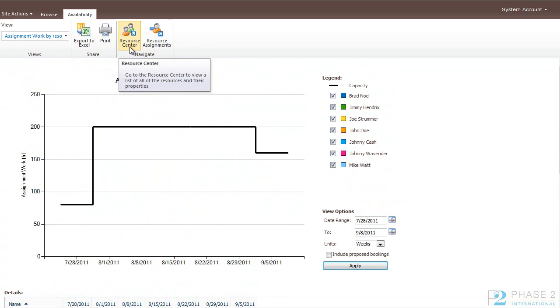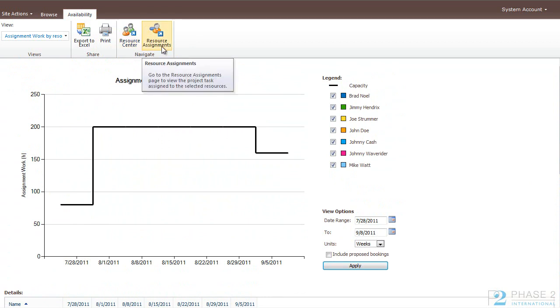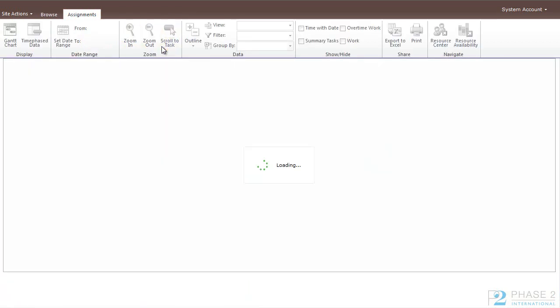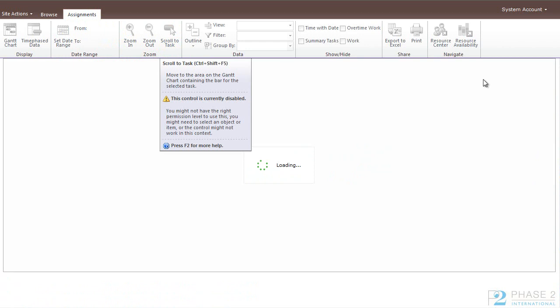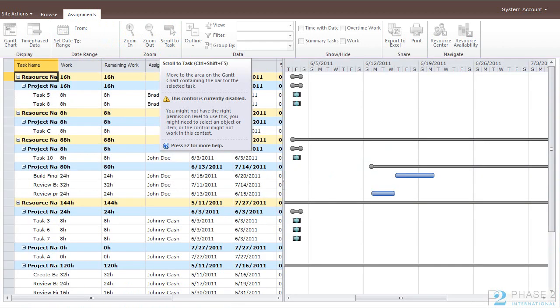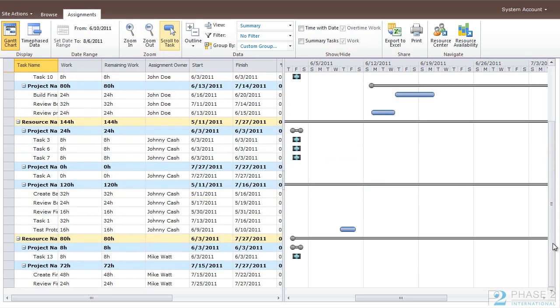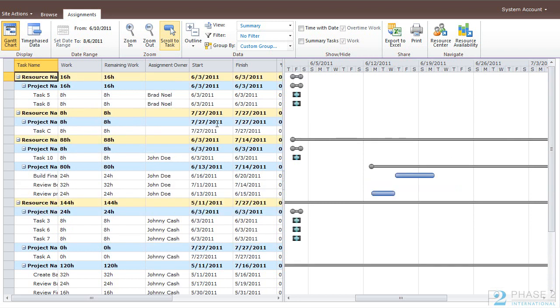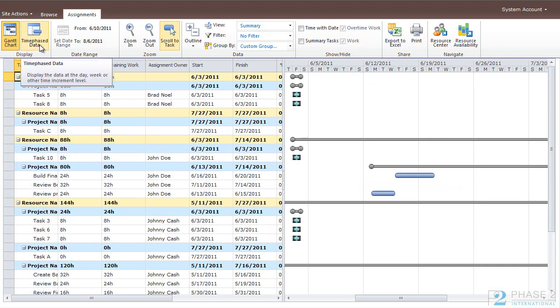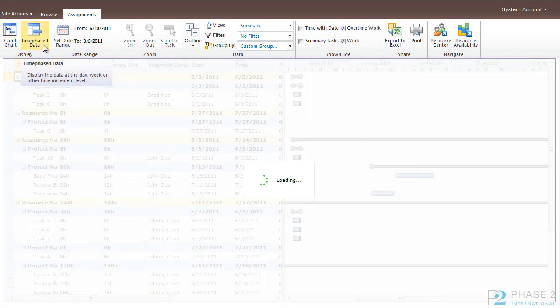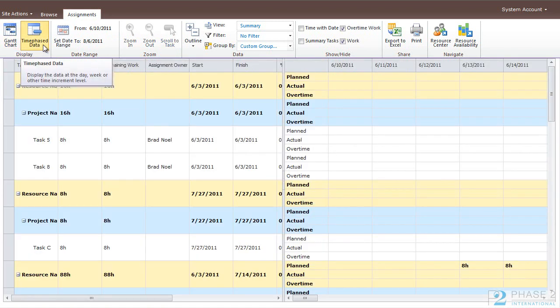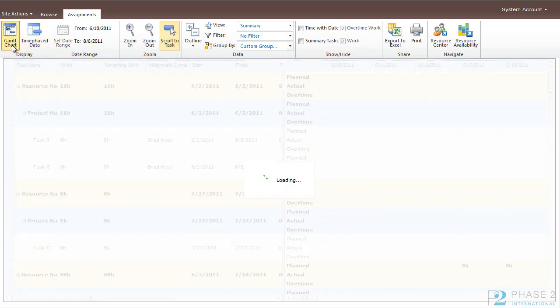From here and also from the main Resource Center page, you can click on Resource Assignments. And this will give you a view of the exact projects and tasks that are assigned to each one of the resources that you chose. This gives you an idea of where they are, what they're doing, and the other one gives you an idea of their time. So these are really nice tools for a project manager to manage their resources. You can also choose to show it in the Time Phase Data view or Gantt chart view.